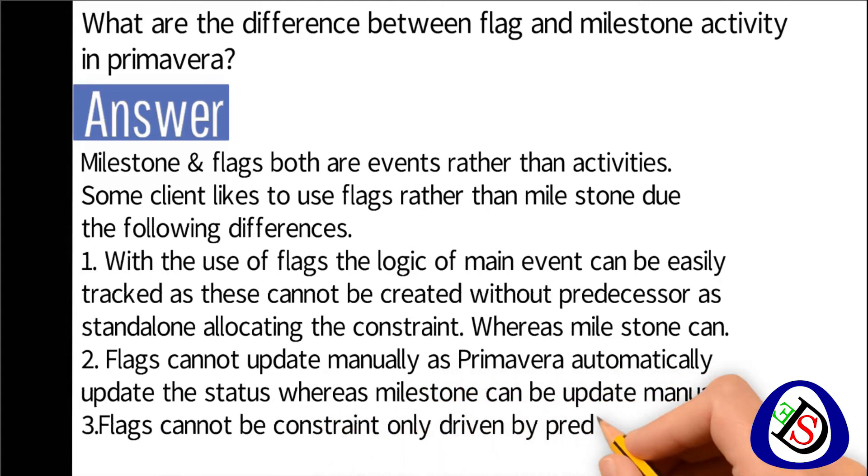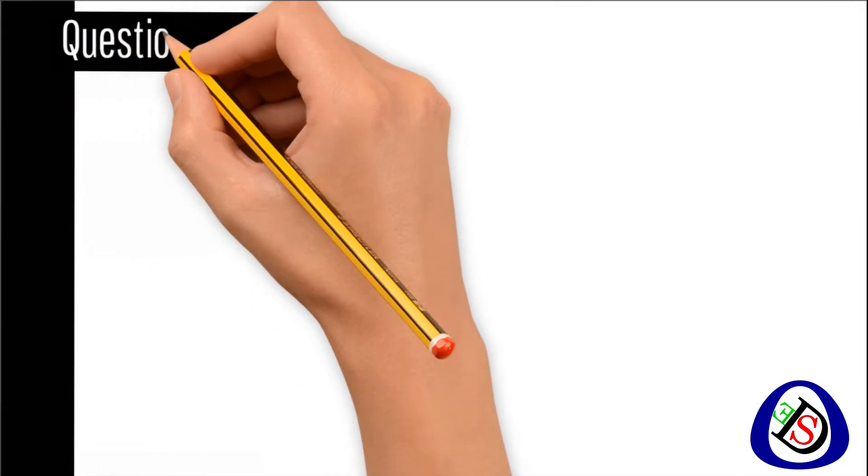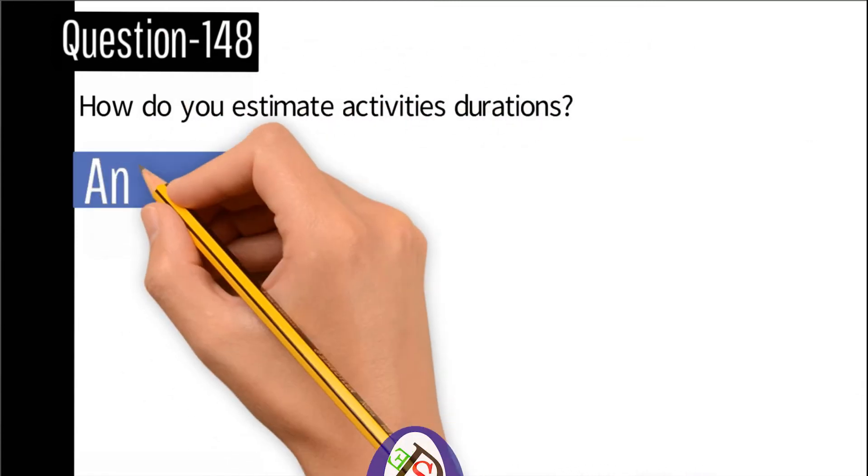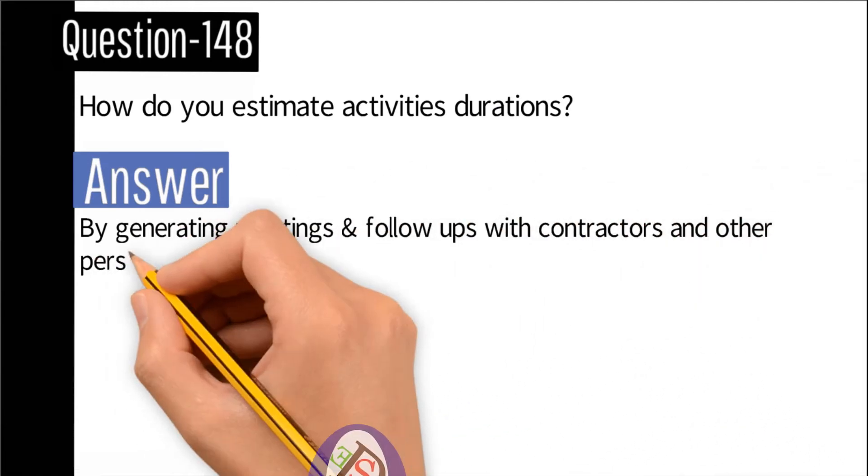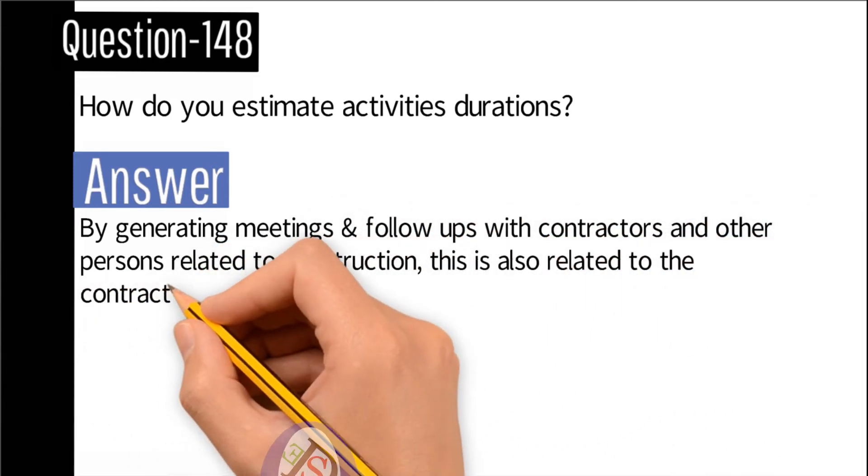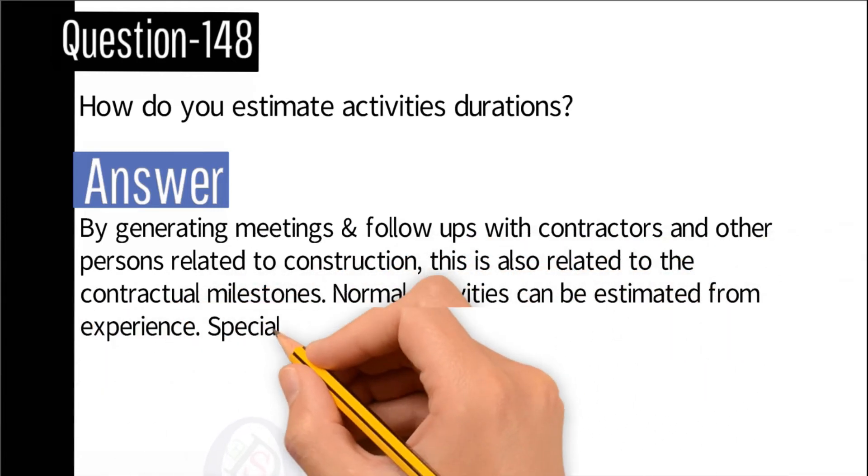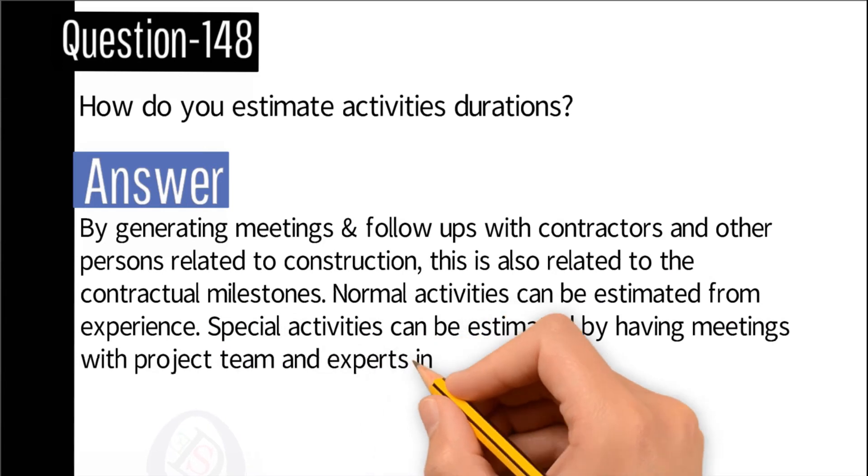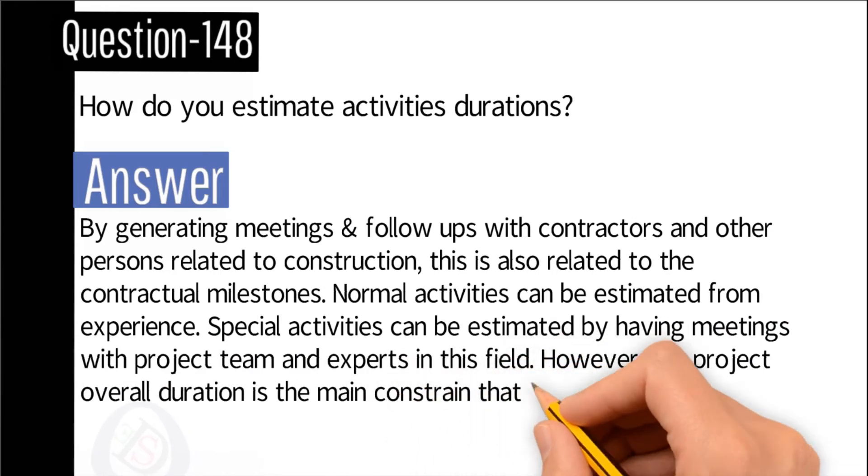Question number 148: How do you estimate activities durations? Answer: By generating meetings and follow-ups with the contractors and other persons related to construction. This is also related to the contractual milestones. Normal activities can be estimated from experience. Special activities can be estimated by having meetings with project team and experts in the field. However, the project overall duration is the main constraint that might affect all other estimations.